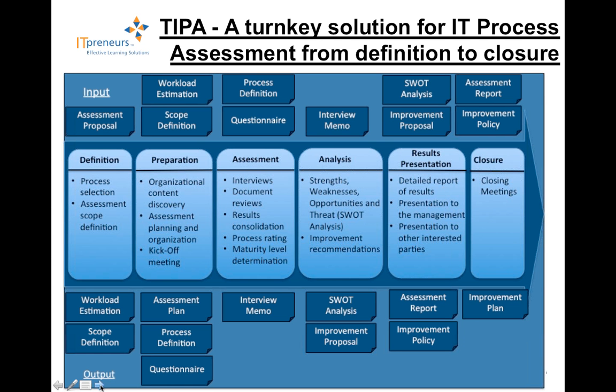The last phase is the closure phase, and that is where, just like any project, following good practice of project management, we will look at ensuring that we did what our sponsors required us to do, that they got the deliverables that they were expecting, and that they're satisfied. And then we can learn if there were any issues. So we want to do the lessons learned internal to our team, the assessment team, and make sure that we improve our own process and do even better the next time we conduct an assessment.